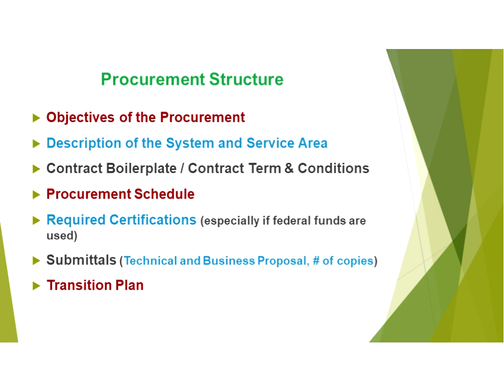You want to discuss your clientele group, especially if you provide human service agency rides. You want to discuss each agency and their clientele, including their service needs. And it would be helpful, certainly, to have a most recent annual report or possibly monthly reports available for them to look at. Technology vendors need to know the environment of the service area. So not only is it how big the service area is, but how good is the cellular coverage in that service area, or failing that, FM, which is an alternative that will be in an upcoming blog. FM radio, actually. Several transit systems use FM for communications. Is the coverage throughout? Mostly, but with holes, which is fairly common, or little to none. So a general description of the topography may also be relevant, especially for mountain ranges and deep valleys. Deep valleys often are holes.